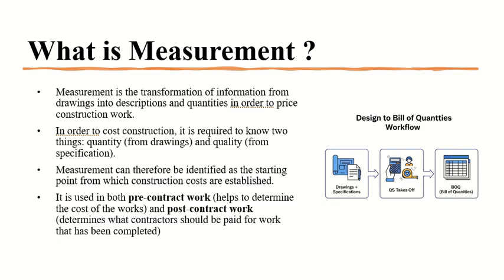How do we go from pre-contract to post-contract? We compare the prices. Yeah. So how would somebody give you the prices if they don't know the quantities? From the BOQ. Yeah, so they need the BOQ, the quantities, so they can give you their prices.